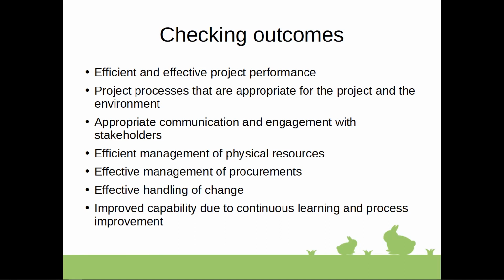Effective change handling, depending on type of project. So projects using predictive approach will have a change log that will demonstrate changes that are being evaluated. It's done holistically with consideration for the scope, schedule, budget, resources, stakeholders, and risk impacts. And change log is one of the major project artifacts that is produced during the project execution.